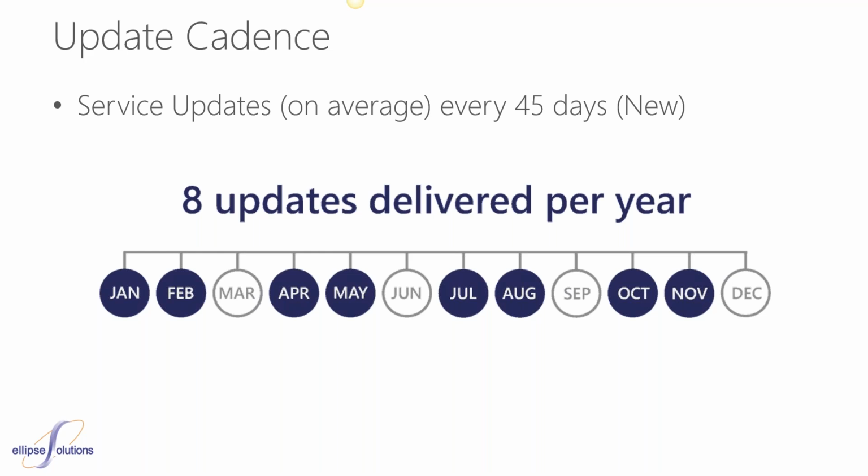Service updates will have those functional changes as well, the application changes, etc. The platform updates have typically been more kernel-oriented type updates. So just rest assured. The other important element is you can pause 3 times. Pausing 3 times means that, guess what? You can have between updates 6 months. Far better than the original, we're going to have to update every month, or worst case every quarter. That's a lot, and it's a lot for Microsoft as well. So I think the realization was practical from their side, but I think this